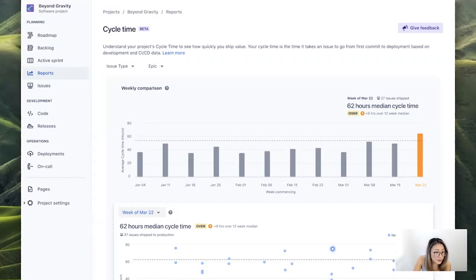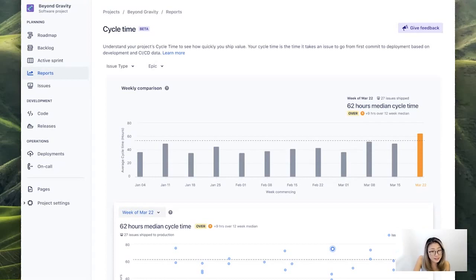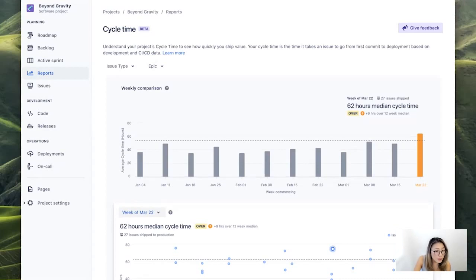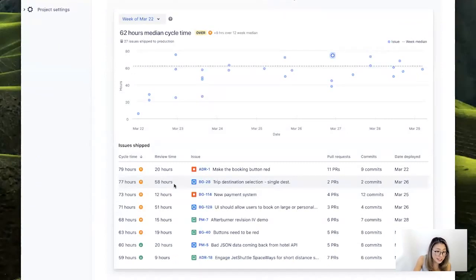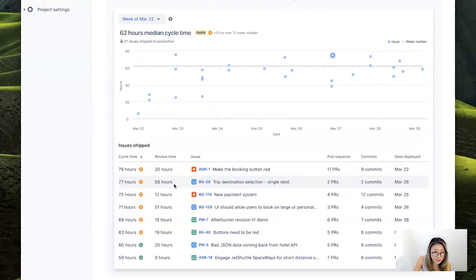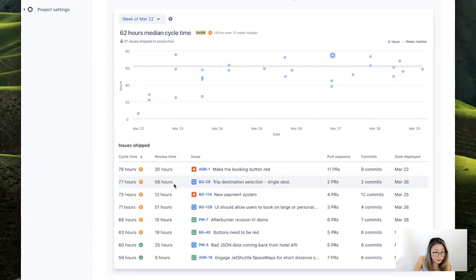So here you see the weekly comparison of cycle time, where you can easily identify which weeks has longer cycle time than others. But mostly, we're here to understand why. So let's scroll down to dig deeper into the table to see what's going on, which is conveniently ordered by longest cycle time first, to get more information about the problematic issues.